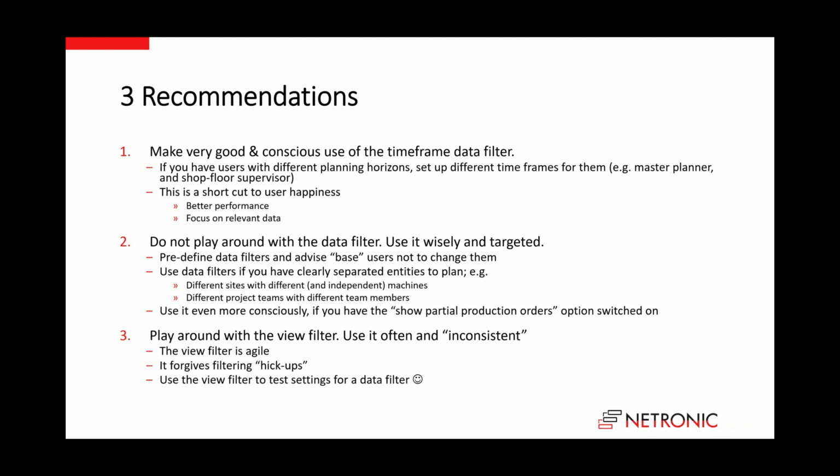It also forgives filtering hiccups because you can just switch it on, switch it off. Even if you have switched it on and you change things, things will not fundamentally break, because the VJS and the VPS know about all the other data that are filtered out just for this moment, right? And also use the view filter to test settings for a data filter. So if you want to implement a data filter, do it with the view filter first. Do it, and if you don't need it, delete it. If it's good, okay, then remember the settings and build it as a data filter.